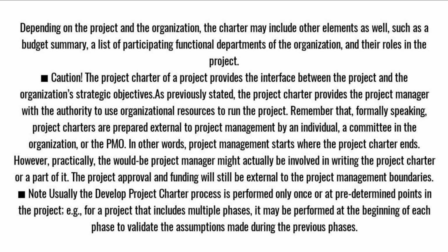Caution. The project charter of a project provides the interface between the project and the organization's strategic objectives. As previously stated, the project charter provides the project manager with the authority to use organizational resources to run the project. Remember that, formally speaking, project charters are prepared external to project management by an individual, a committee in the organization, or the PMO. In other words, project management starts where the project charter ends. However, practically, the would-be project manager might actually be involved in writing the project charter or a part of it. The project approval and funding will still be external to the project management boundaries.